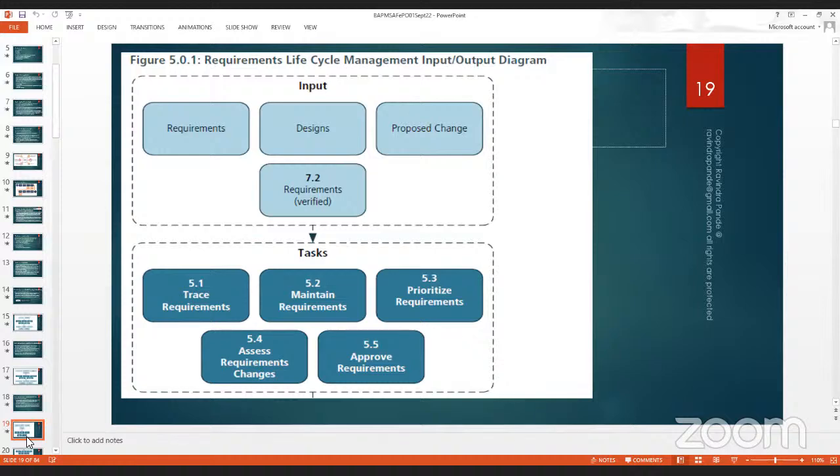Then prioritize the requirement. Whenever we sanction the requirement, we ask the client to guide us which requirement we should complete first. Should we develop the web page first? Should we develop the Android application first? Should we develop the BlackBerry or iOS application first? Depending upon the client requirement, we prioritize these development creation activities in our project management plan.